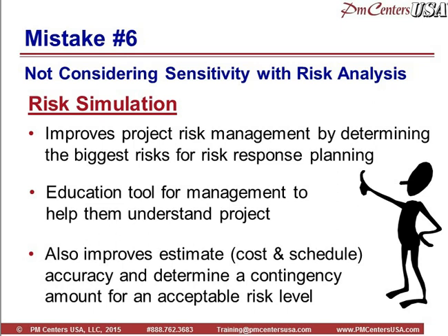And the only way I know of doing this is using what's called Monte Carlo or risk simulation software. And I've done that on major projects. And what it does, it gives you more complete results and helps you determine what are the real big risks on this project that we need to deal with. It really helps the project team and management understand the project better. And most importantly, in my opinion, it gives you the ability to decide on contingency amounts for both cost and schedule to manage the risk.